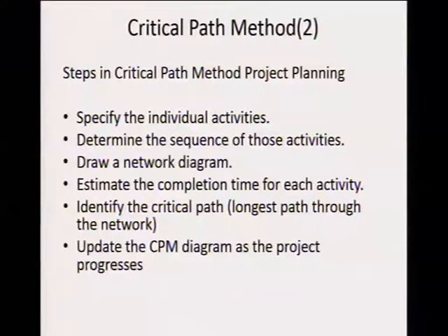So there are certain steps that you have to follow if you use, of course, the critical path method. You have to make sure that you have individual activities, and you have to specify those activities. Those activities need to be very specific. And once you have activities, then the activities must have a sequence. It must be chronological. It must follow a sequence. So it needs to be consistent as much as possible.